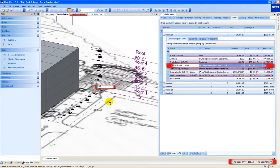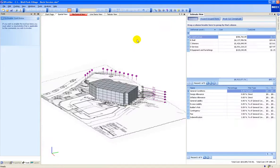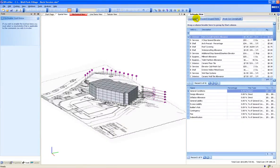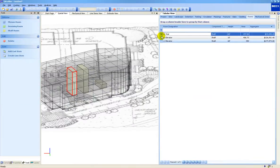For example, a change to the floor-to-floor height may impact the costs for interior framing, paint, drywall, structural elements, and cladding materials. The quantities and costs will update in real time as the dProfiler model is modified.